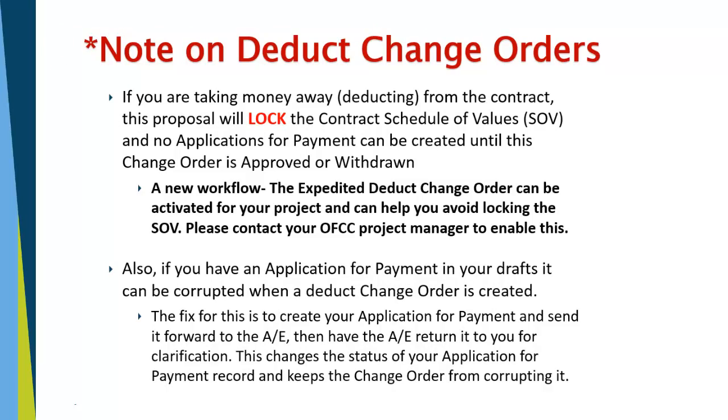Before we walk through the change order process, there are a couple notes about deduct change orders. If you are taking money away from the contract, this proposal will lock the contract schedule of values and no applications for payment can be created until that change order is approved or withdrawn. There is a new workflow, the expedited deduct change order workflow, that can be activated for your project and can help avoid locking the SOV. You can contact your OFCC project manager or project coordinator to enable this.